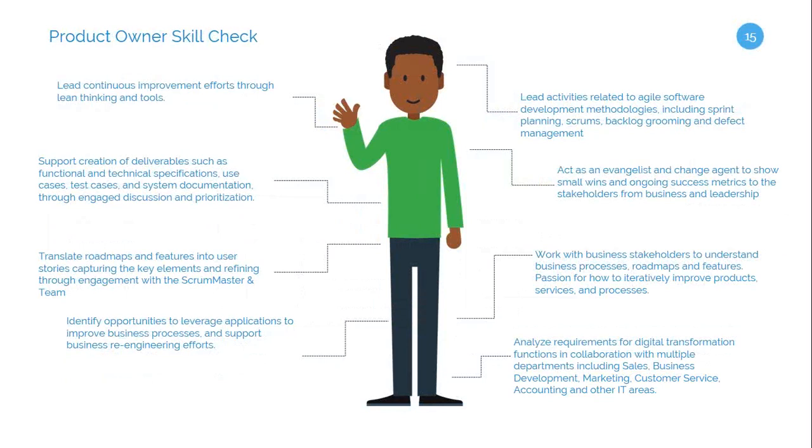So translating roadmaps into features, essentially, the product owner is giving us our prioritized map to the future with our team. The more complicated part is when I have a maintenance team that's working on a team backlog instead of a product backlog. Essentially, a product backlog is dedicated to one application typically. Many maintenance teams end up having to share a backlog across multiple products, multiple applications, in which case we call that a team backlog.